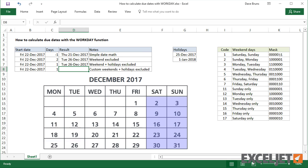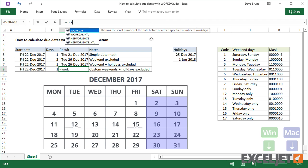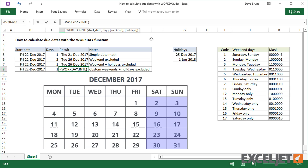Finally, what if you need to treat a weekend day, like Saturday, as a Workday? In that case, you'll want to switch to the WorkdayINTL function, which allows you to customize weekends.